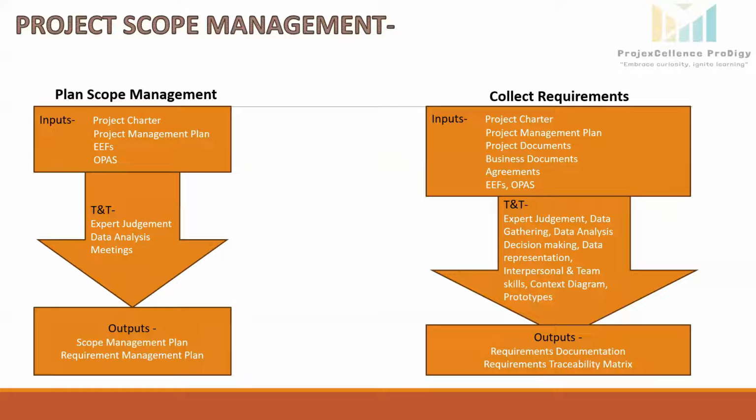Product analysis might involve breaking down the solar power plant into its main components like solar panels, inverters, mounting systems, electrical connections, and monitoring systems. The project team might analyze the required features of the solar power plant, such as energy output, efficiency, durability, and environmental impact. Product analysis will ensure that the project scope includes all the essential features and functions of the solar power plant, leading to a clear and detailed scope definition that meets the project's objectives.